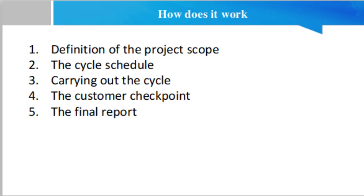The third point is carrying out the cycle. In this stage, you start working on the project, follow and adjust the cycle as you go along. The cycle ends when the previously defined time has elapsed. Anything not completed in the cycle will be carried over to the next cycle. In each cycle, it is important to note all requests for change and ideas for improvement. Problems encountered should also be noted so that they can be addressed in subsequent cycles.